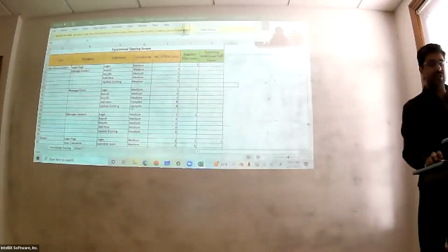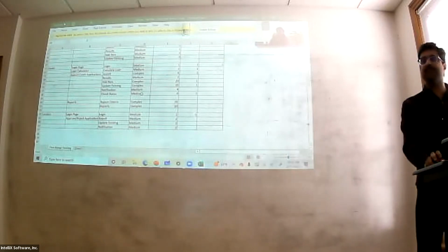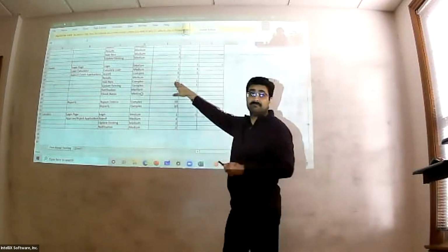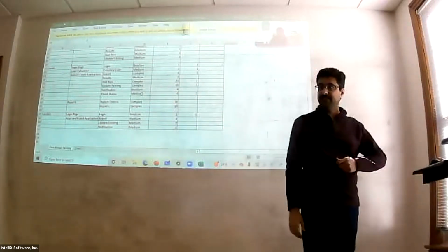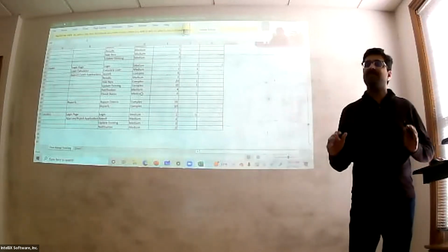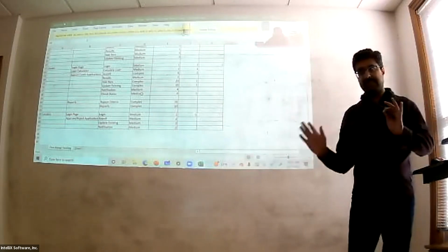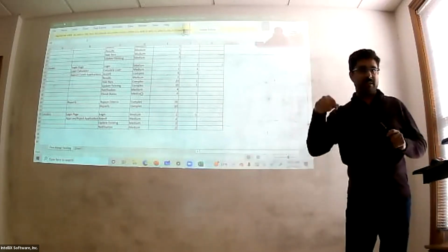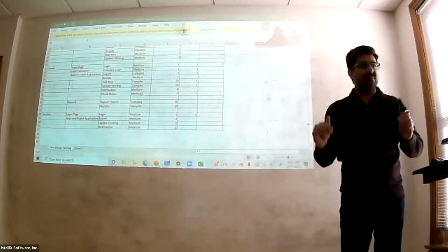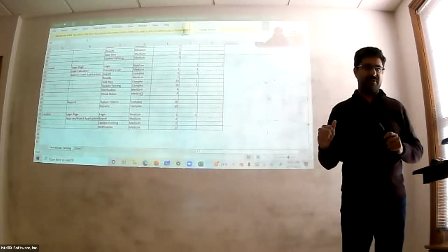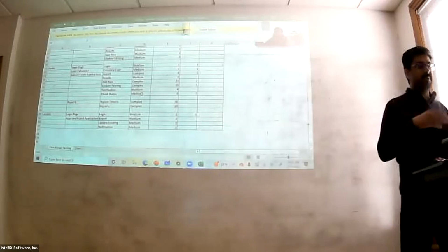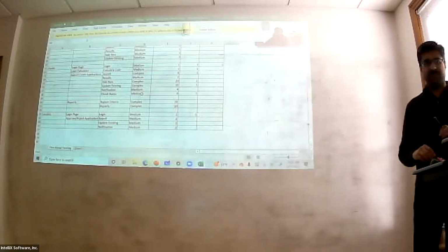That gives you a view of how many test cases I'm going to build. And as you go through it, credit application is a complex one. I'll need a whole bunch of test cases for that. So you come up with some sort of framework to guesstimate. Until you start writing, you don't know whether you're going to break it down further or not. But you can roughly say that's one scenario, that's multiple scenarios. So you can come up with a number of simple, medium and complex test cases you're going to write for the system.